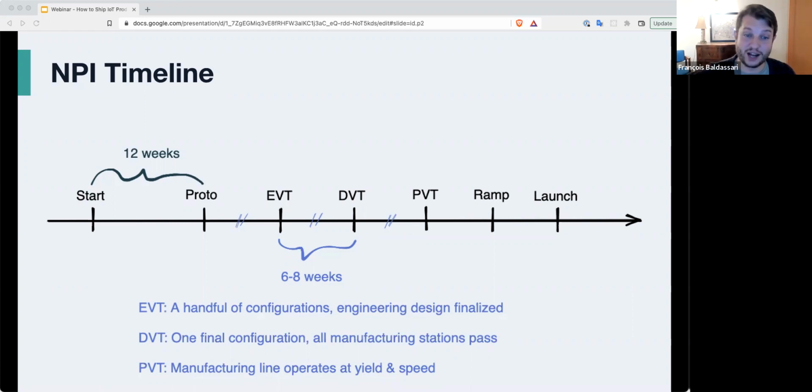And of course, each time, you've got to do a whole spin, which means at minimum, you're spending 4 weeks iterating on your EVT design. And so, of course, if you get to EVT5, that's 4 times 5, that's a 20-week delay, right? And so, the success criteria here is that one of your configurations works just like you wanted it to. And we'll talk about the software side because in order to make that determination, you'll need software to be in a specific state.